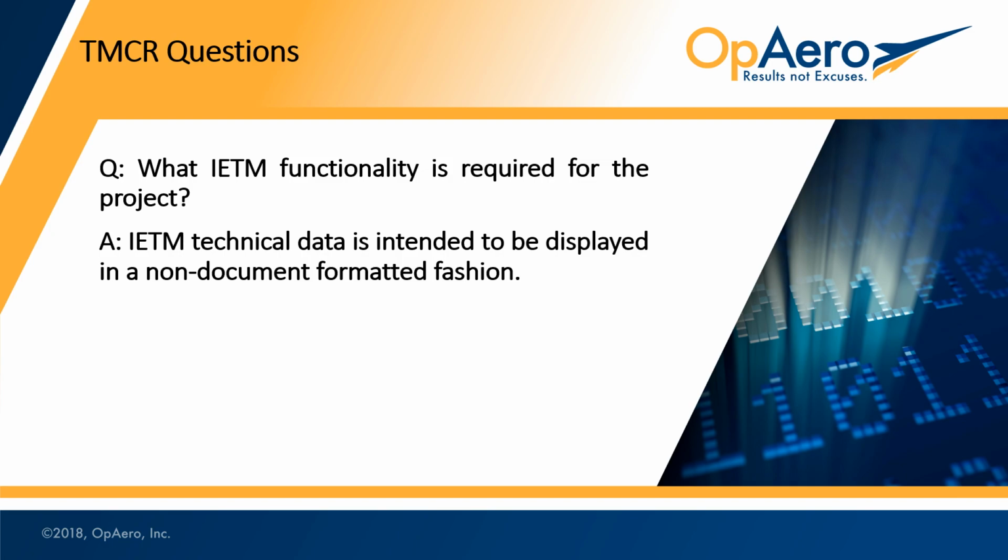The degree of that interactivity and functionality should be commensurate with the maintenance philosophy for the weapon system and be made available through project funding. So what we have in the DoD is called a functionality matrix, and that's intended to indicate the possible various capabilities of what your tech data should be doing as it acts inside the viewer.